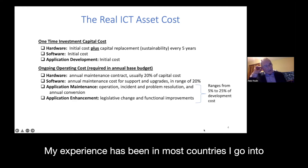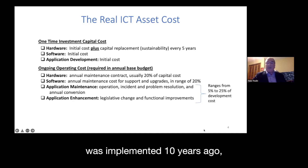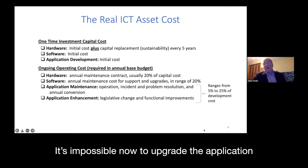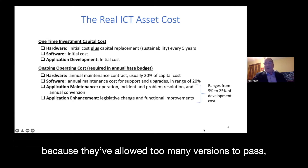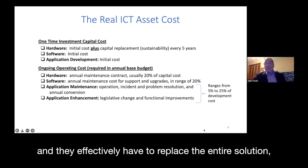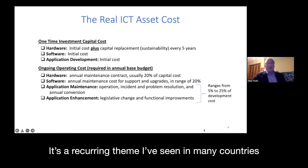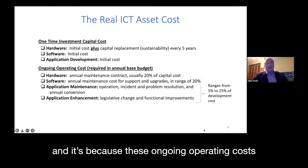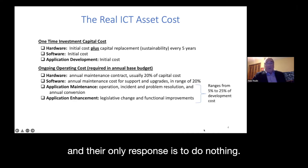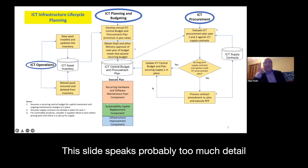In most countries I go into, these costs have not been addressed. It's sad to see something implemented ten years ago where the servers and software are all past end of life. It's impossible to upgrade the application because too many versions have been allowed to pass without following the vendor's upgrade path, and effectively the entire capital investment is lost — you're starting over again. Departments are left on their own with no money, no budget, and cannot sustain the IT investment that was made.